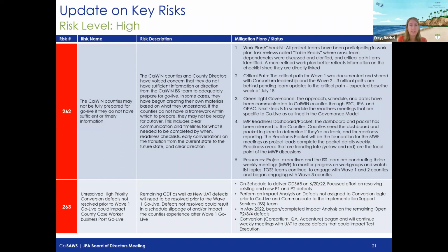Okay, Arnold, 263, sir. Sure, 263, unresolved high priority conversion defects that remain unresolved prior to the cutover could impact county-based caseworker business. And so if we look at our current status for our wave 1, as we currently stand, we have 0 priority 1 defects, so major defects.